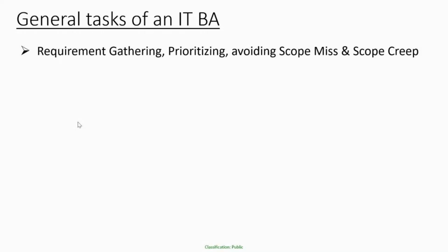At that point of time, it becomes important to prioritize the requirements and say that, out of all these n number of requirements that are there, these are the top few requirements which we must definitely get rolling. Then these are the next set of requirements which are not very much required, but we can still look into it if time permits. And then these are the next set of requirements which can comfortably be taken up in a next phase or next launch and things like that.